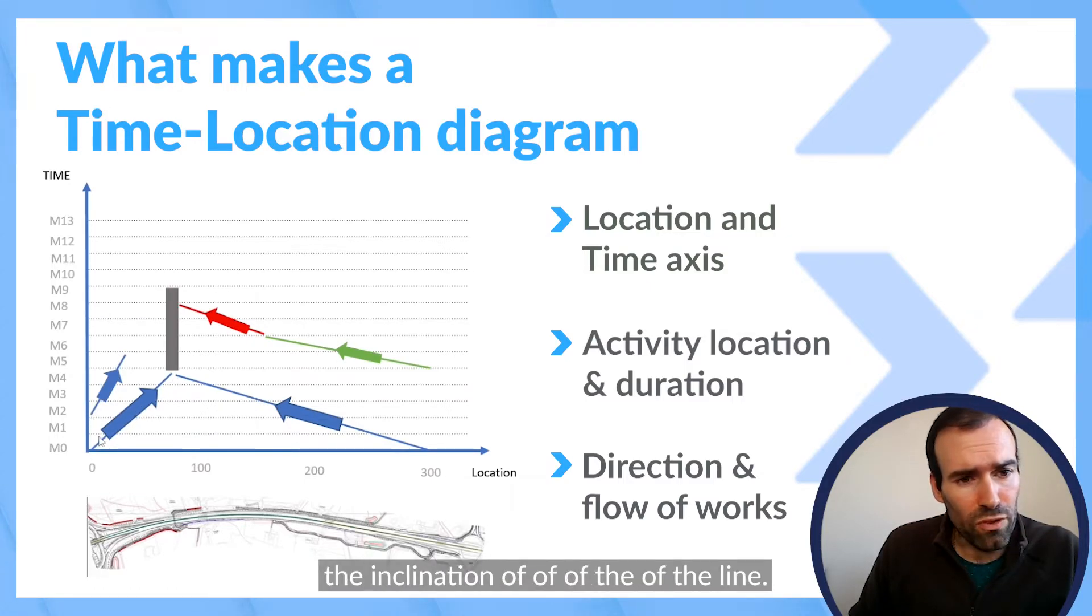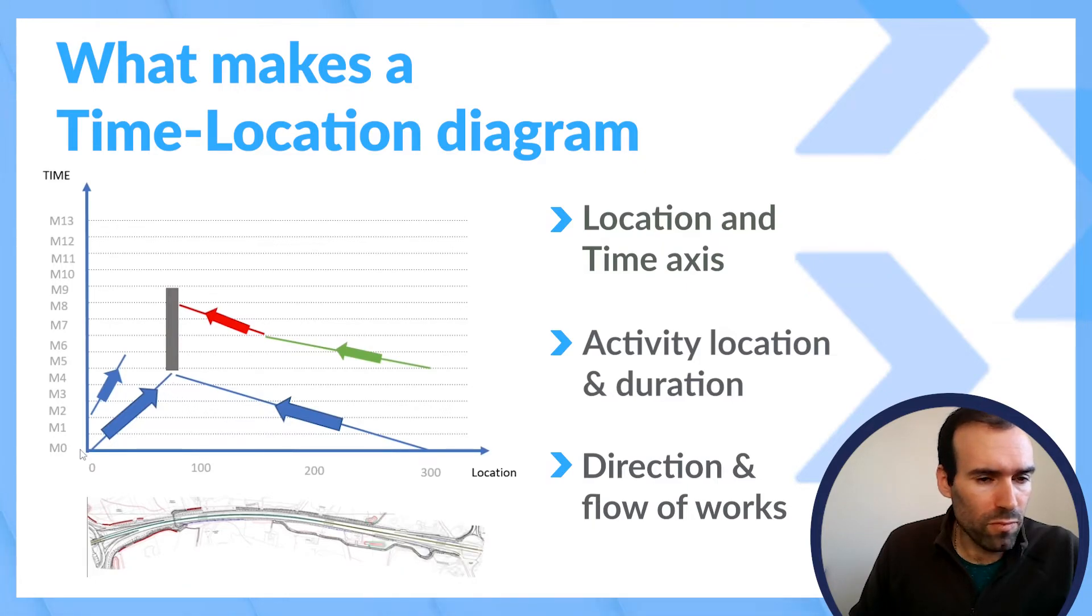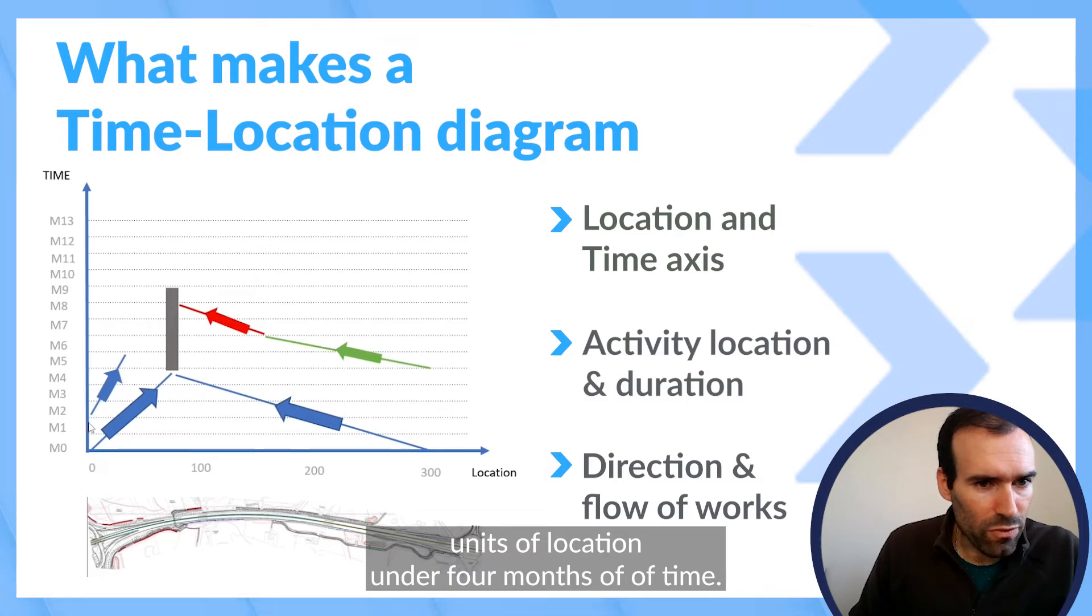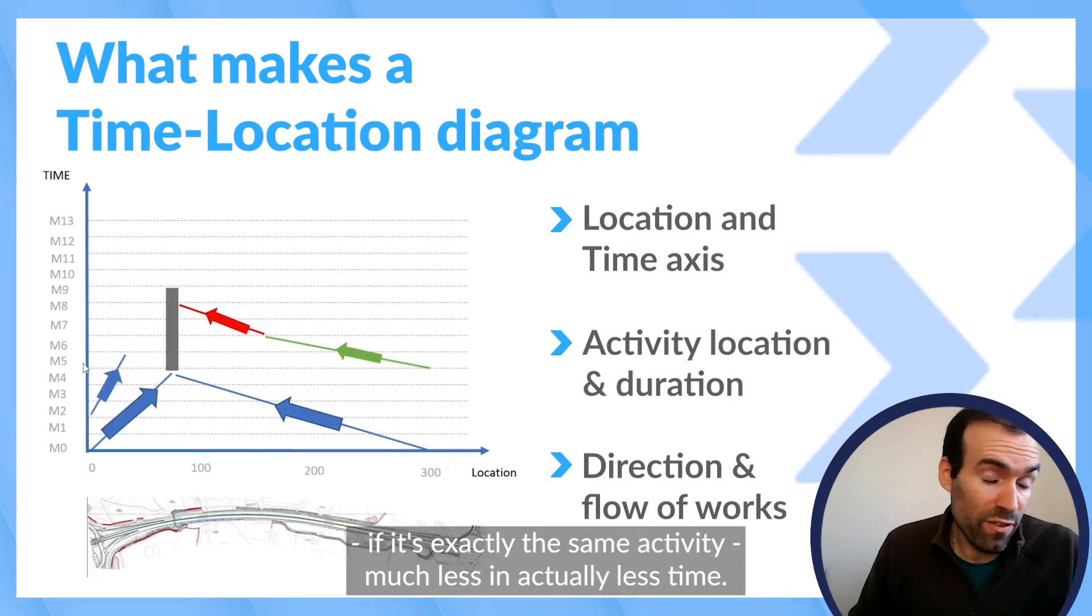the inclination of the line. So in this particular activity, we achieve probably 18 units of location under four months of time. In the other activity, we achieve much less. If it's exactly the same